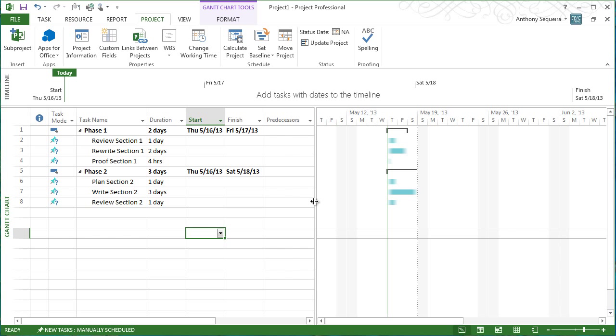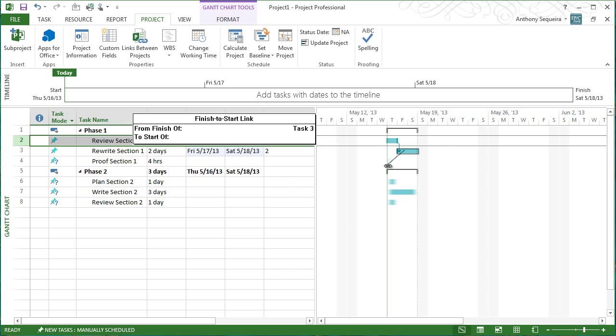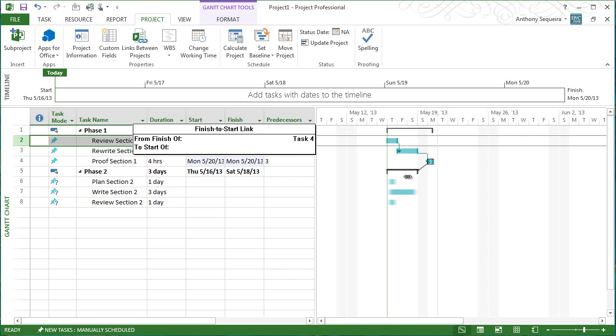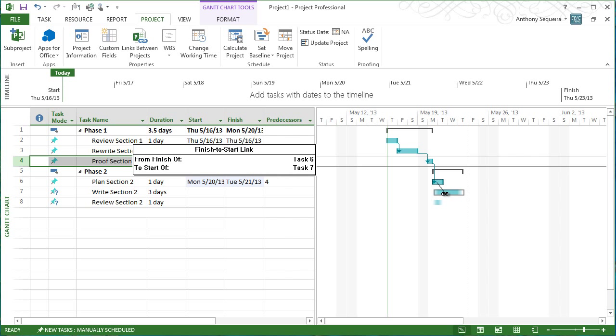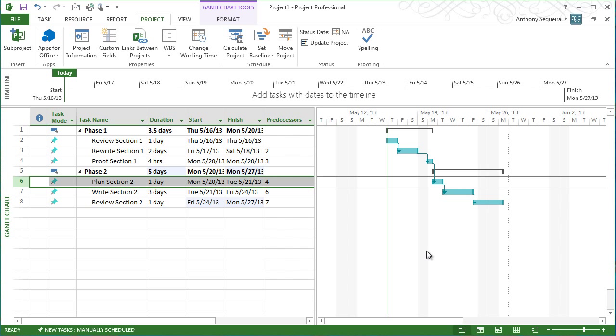Now, let me go ahead and link these tasks together. I'll drag this task down to this one because rewriting section one certainly needs to follow reviewing section one. And rewriting section one needs to preempt the proofing of section one. So, we're just taking these tasks and we're dragging them over each other in the Gantt chart view to link them together. All right, look at this. Microsoft Project tells us that the way I've sketched this out will be done on Monday 5-27 in this particular, or for this particular project.